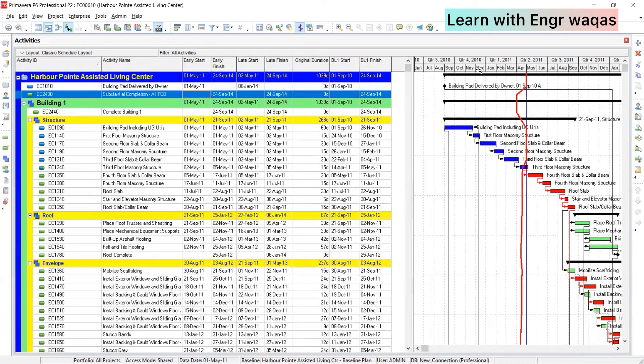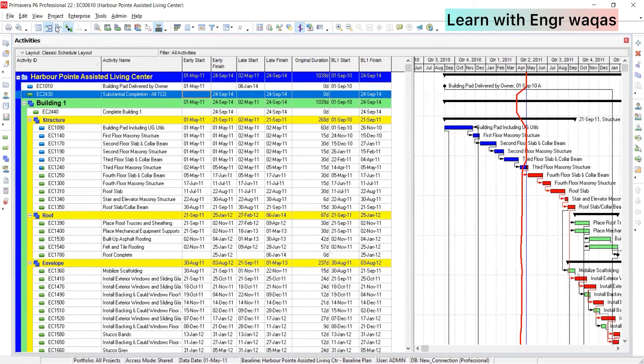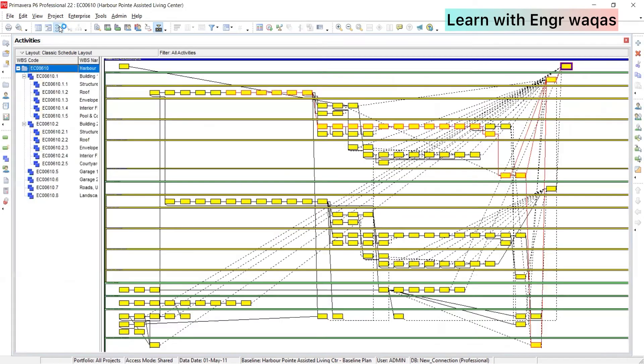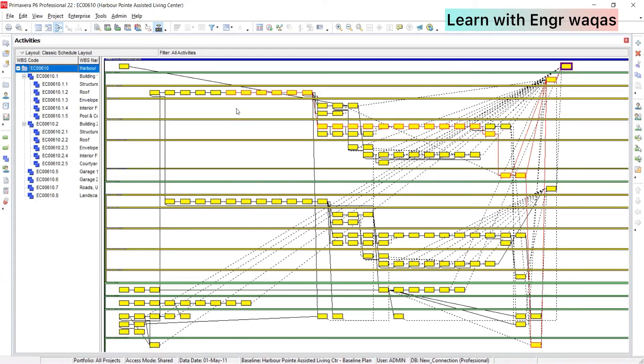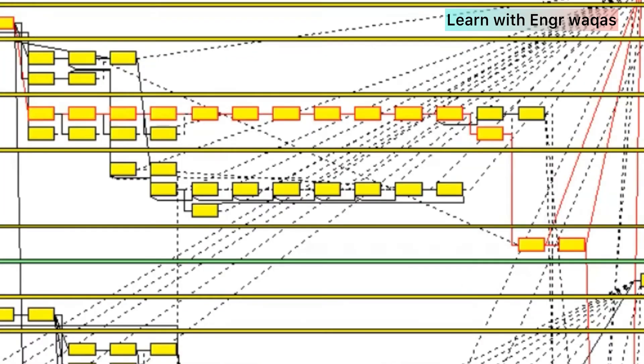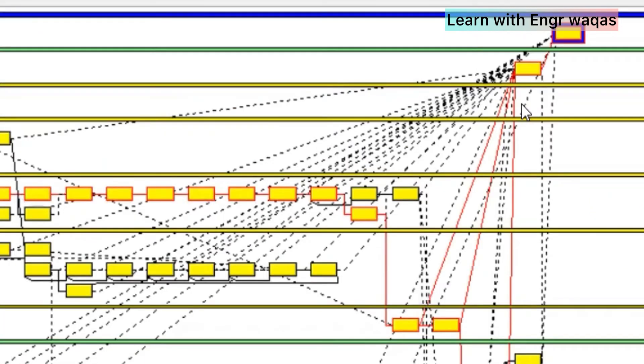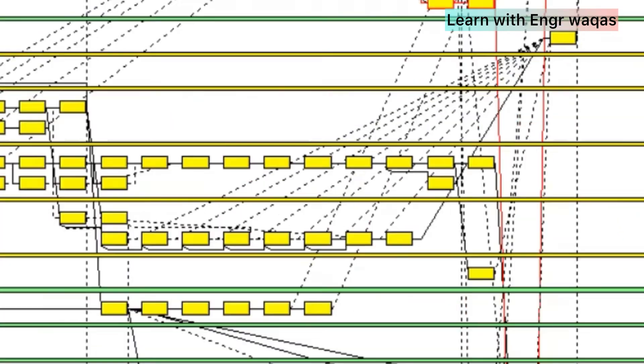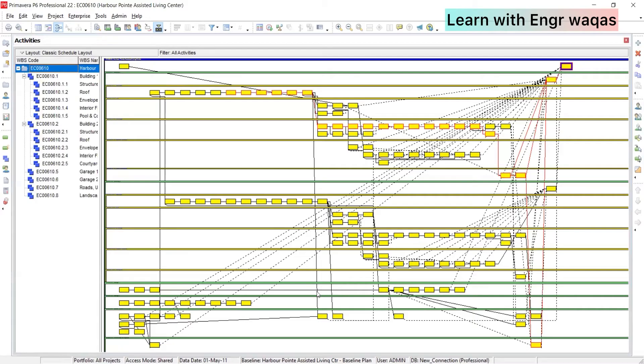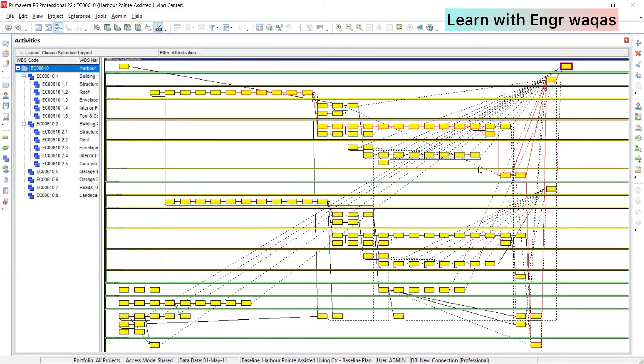The most important thing which will give you the overall view, the bird's eye view of CPM, is to use this feature. Here I am going to click activity network, and you can see how beautiful, how analytical it is. This is activity network diagram. It's giving you each and everything, how work packages are linked with each other, and only red color line is actually displaying your critical path method. All network diagram, all boxes which are connected with red color line are critical, and how it is actually widely spread across your project timeline.